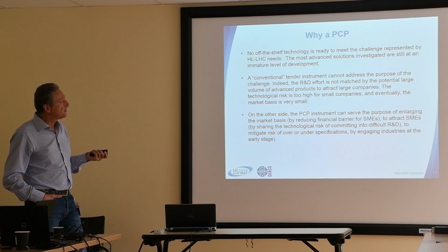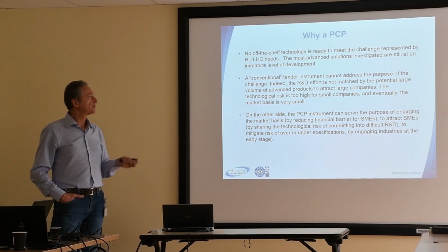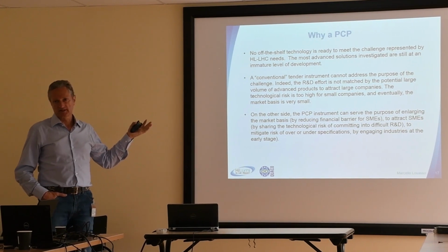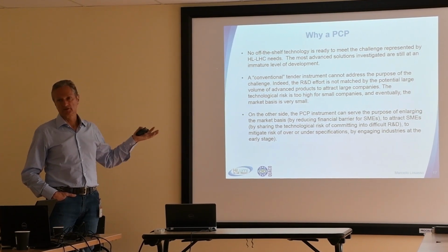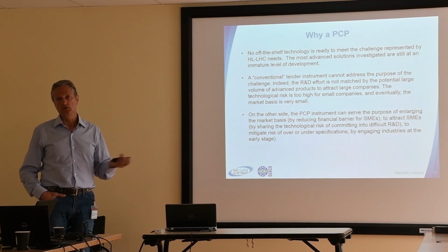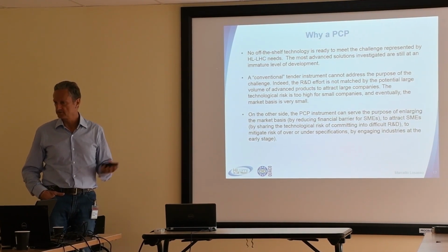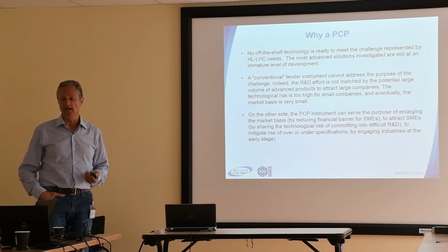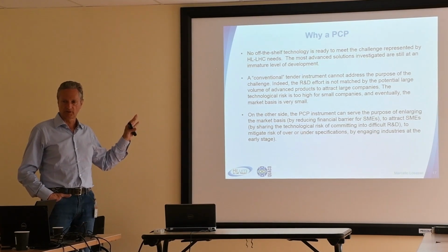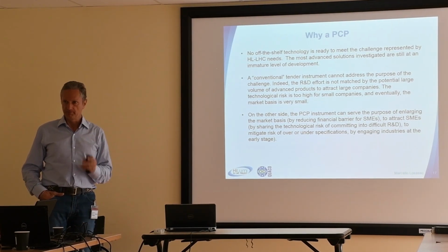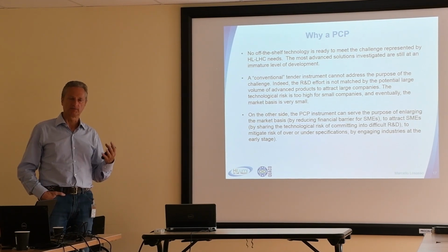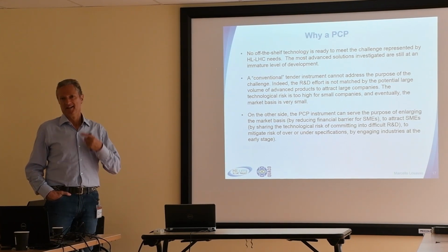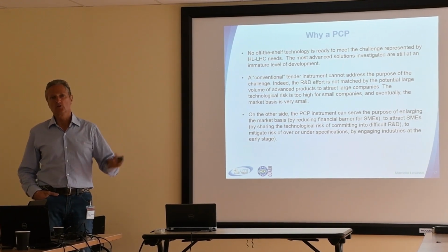And in this way, you can even enlarge the market basis, because you can have a small company that will participate. I make the example of the magnet. Each one of these magnets to be produced has a value of 1, 2 million. Actually, all the companies that participated in our tender were small companies. The big players on the magnet market in Europe did not participate, because they were not interested in a contract of 1 million, 2 million.